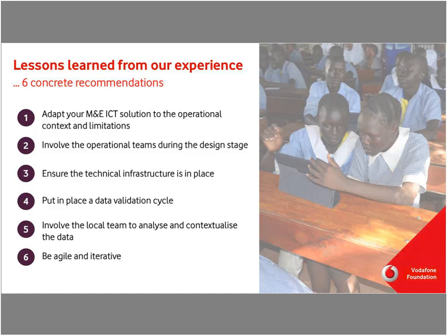Thirdly, ensure all the technical infrastructure is in place. That's important so that you don't get any barriers for people to actually use your solution. And so in our case, for example, that included the distribution of dedicated M&E tablets for the team to be able to do the reporting without having any constraints or relying on their own phones or own devices.